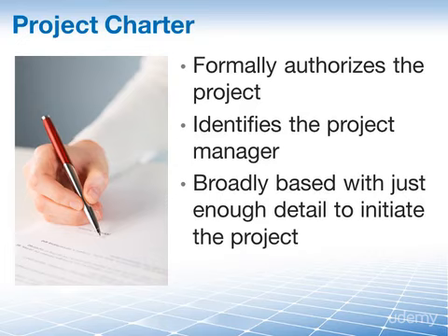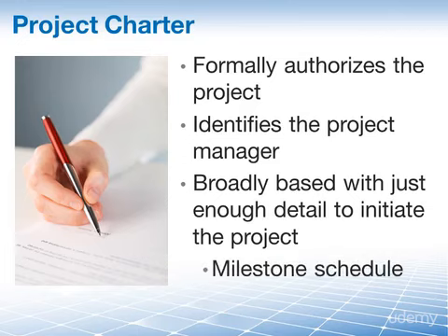Well, the project charter already contains a high-level schedule. It contains the milestone schedule, which we outlined in there, saying, well, we're going to start it in this month, we will end it a year and a half later, and here are 3 or 4 milestones in between. This milestone schedule is an important input to planning your schedule management approach.